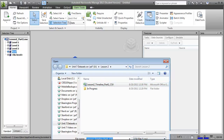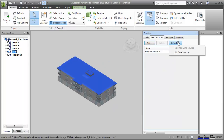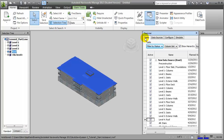Choosing our CSV file, the field selector dialog opens so that we can map the field names in our CSV file to the column names within the Navisworks Timeliner tool. For example, the task name in Timeliner will map to our title field, the external ID will map to task ID, the planned start date will map to our expected start column, and the planned end date will map to our expected end. One critical one to include is User 1, mapping that to the task ID — that will be the field we use to map the 4D Task IDs entered in Revit to the task IDs in the project schedule. Say OK to accept these. Then go to the Refresh menu and choose All Data Sources to rebuild the entire task hierarchy. When we return to Tasks, you'll see that the list of tasks from the CSV file now appears.